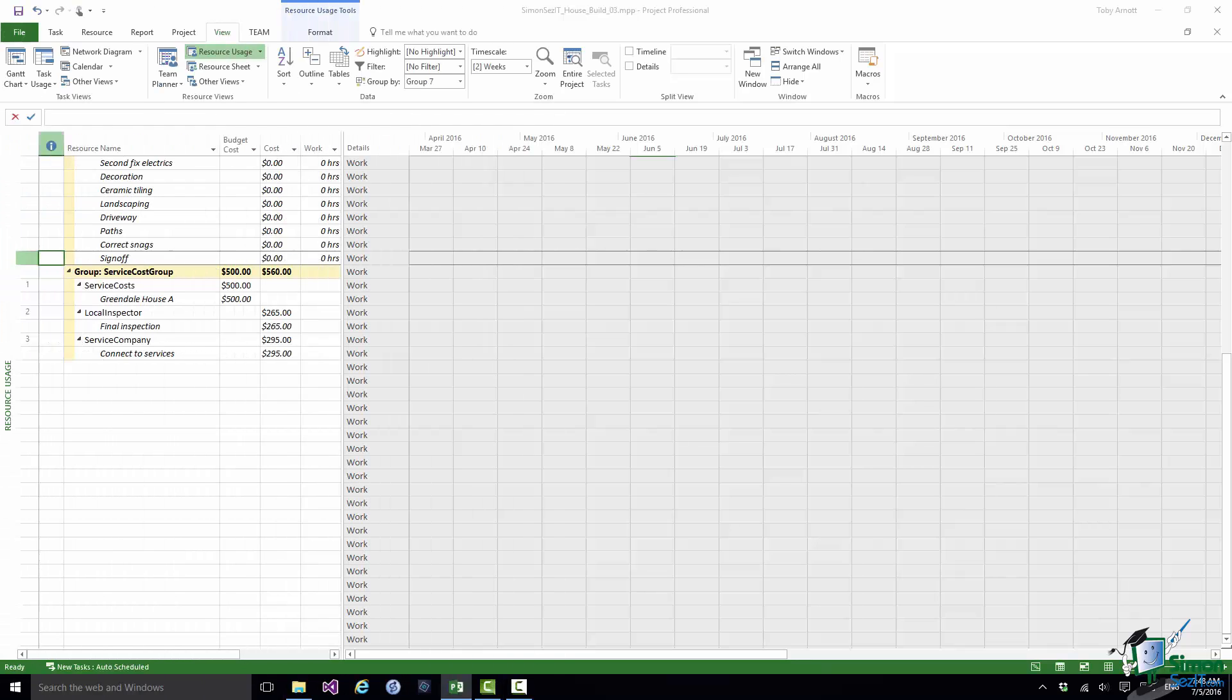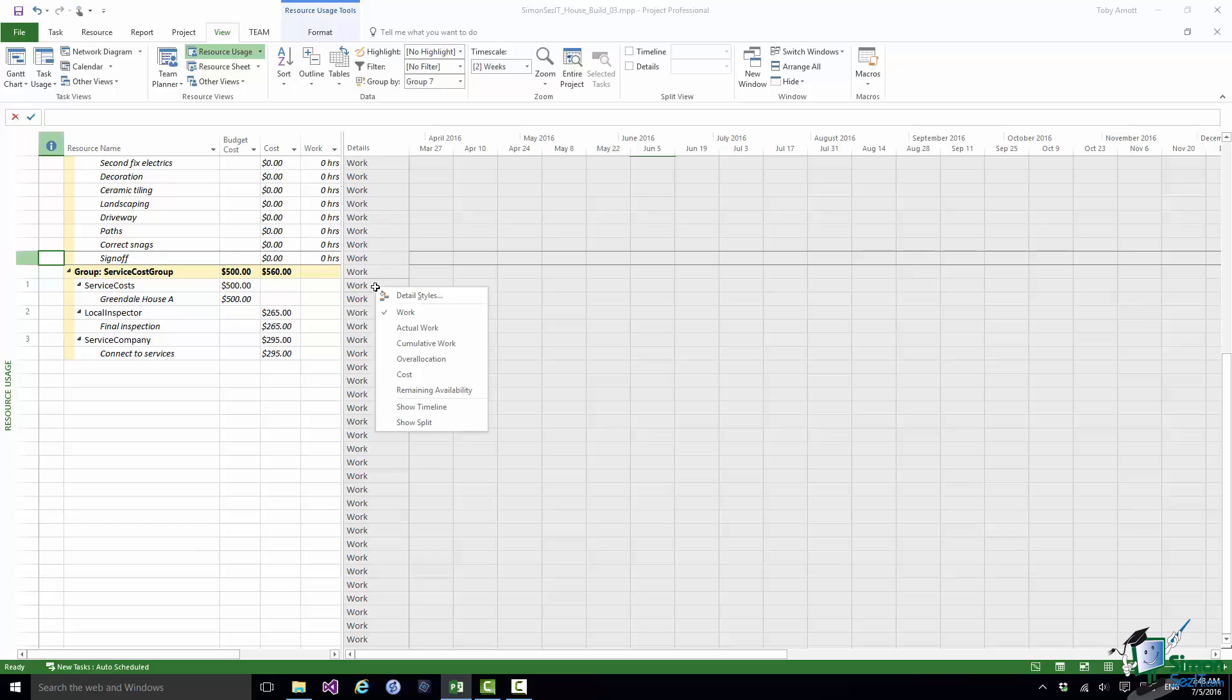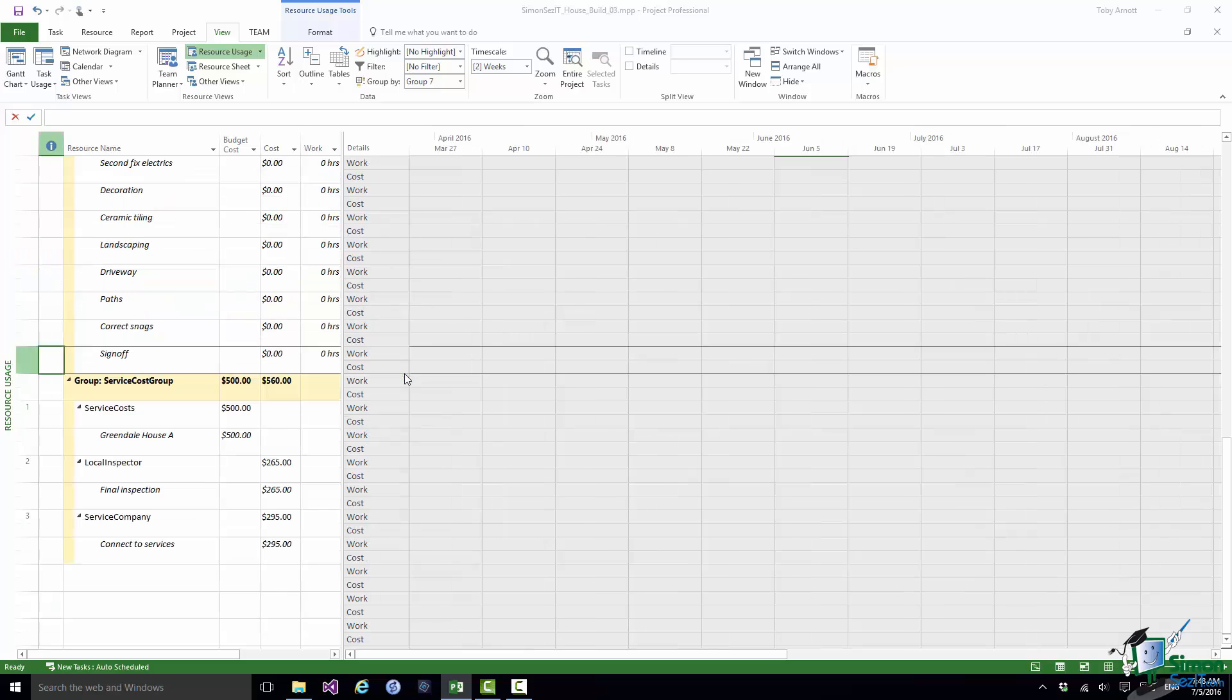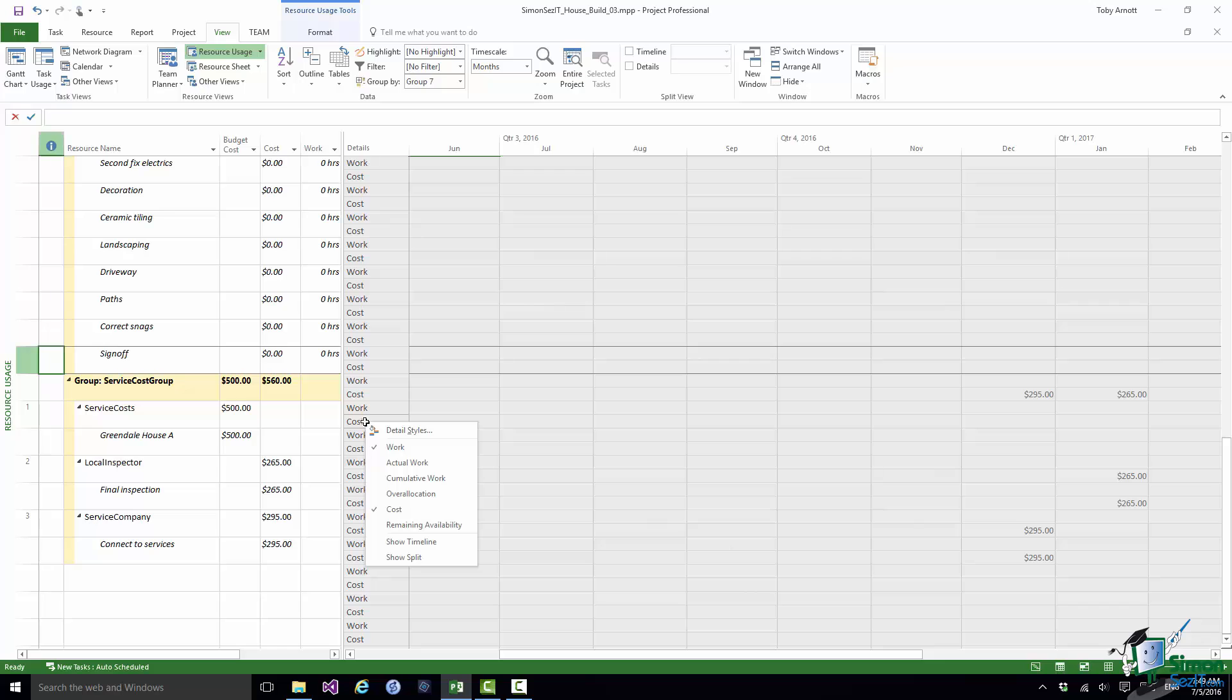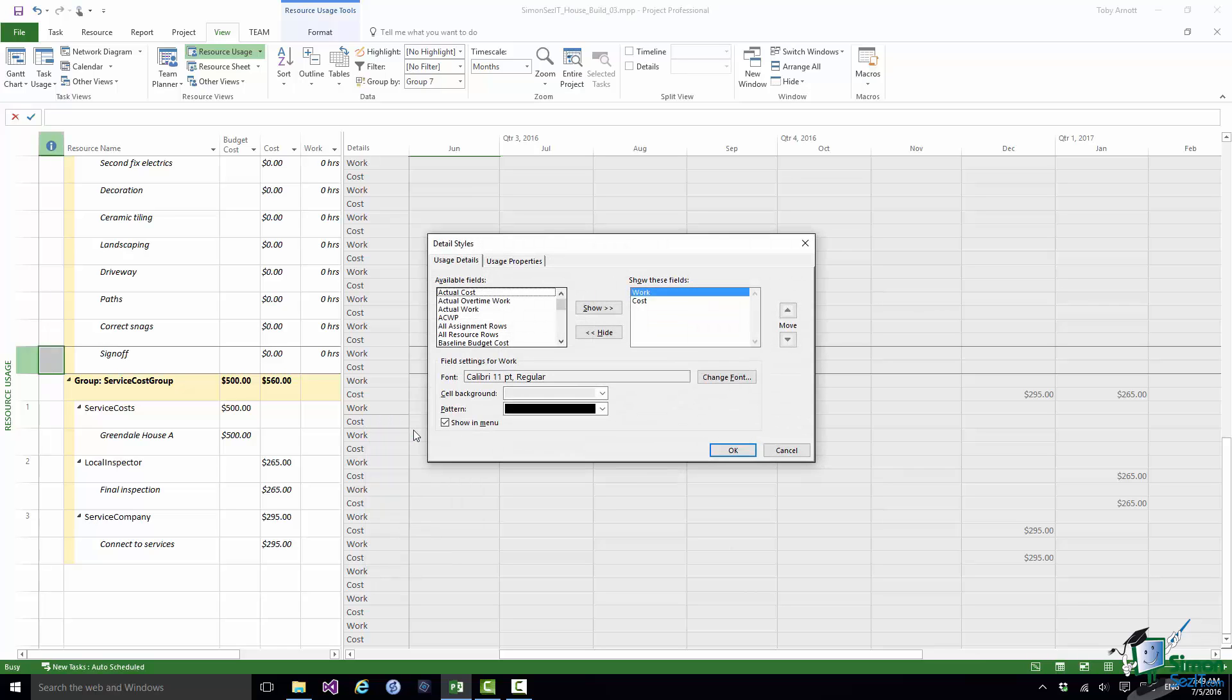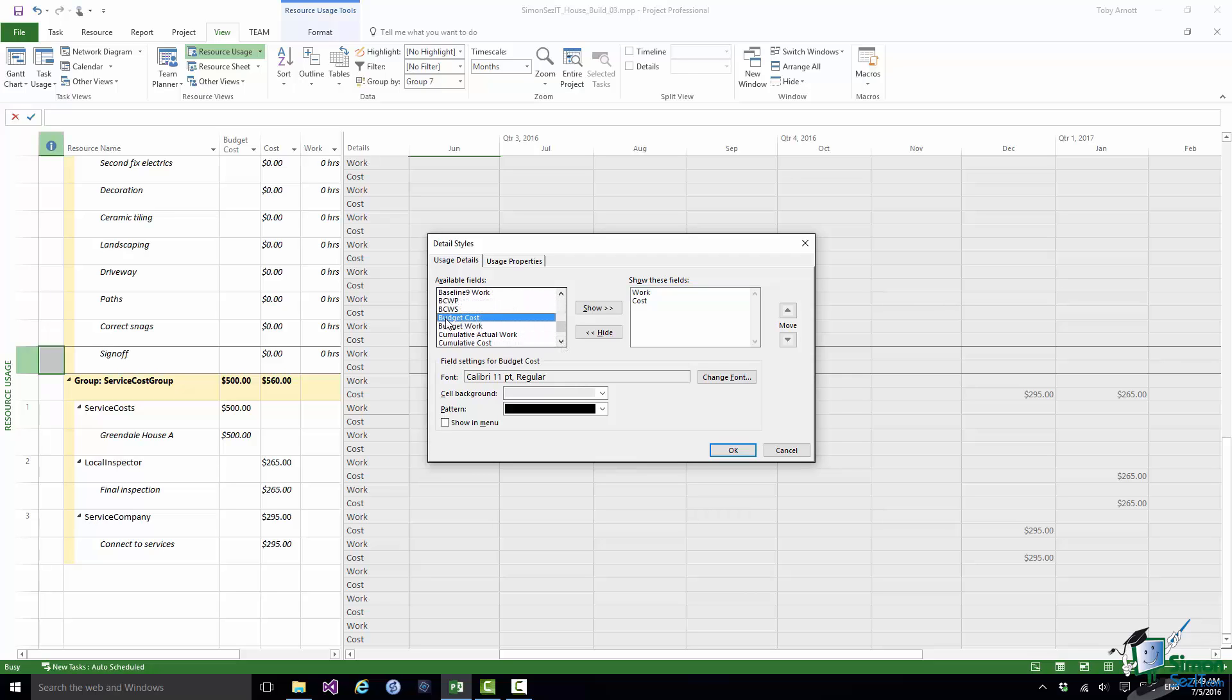There's just one other thing to show you here which is also pretty important and that is you may be interested in the time phased aspects of this. Let me show cost as a detail. So I'm going to switch on cost. Let's just get the project in view. You can see over on the right there those two costs being incurred, the Connect to Services cost and the Final Inspection cost. You may want to see how the planned cost compares to the Budget cost over a period of time. If I right click again on Details and go into Detail Styles, if I go down the list of available fields one of them is Budget Costs. Let me show Budget Costs.